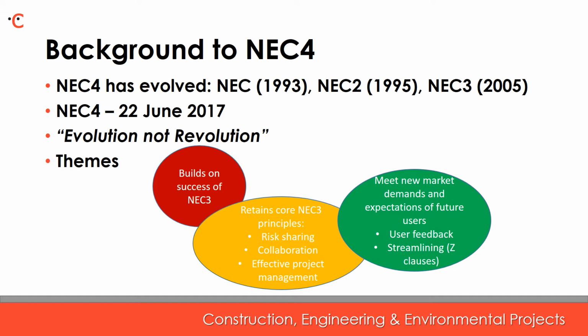Secondly, and part and parcel with that consultation, was identified the clear need to reduce the number of Z clauses or amendments typically in use with the NEC3, and which has led on occasion to considerable alteration of the inherent risk profiles, whilst also causing inconsistency and ambiguities which affected in turn the administration of the contract, whilst also conflicting with core NEC3 principles. For example, one would often see the spirit of mutual trust and cooperation clause deleted.